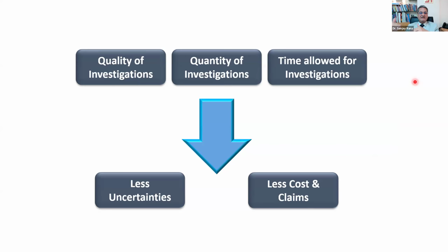And that too, when we talk of a comprehensive exploration program, that is, we are spending some 5 to 7%, or at least 5%, of the project cost on investigation. In fact, in India, in most projects we are spending around 0.75%, invariably less than 1%, on investigation. So actually, you can add one more zero into this uncertainty. With this information, we make our DPRs, we make our plans, we do everything. So can we call ourselves smart decision makers when we are doing things with practically our eyes closed? I'm sure the answer is absolutely no.